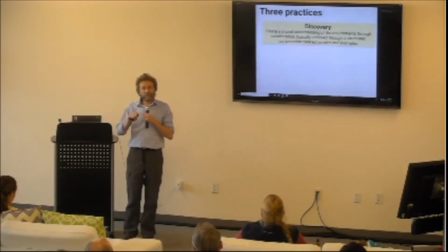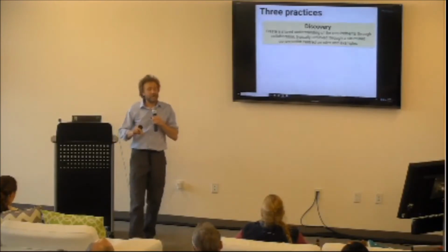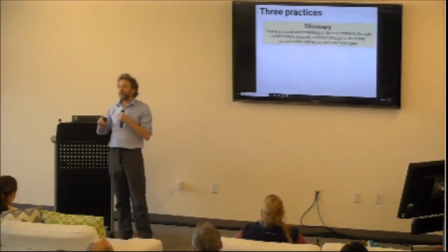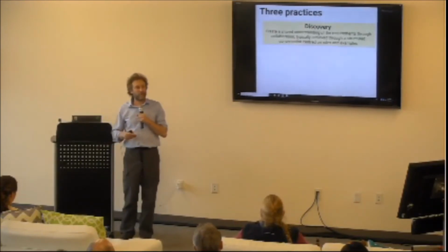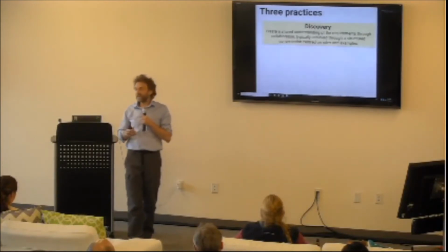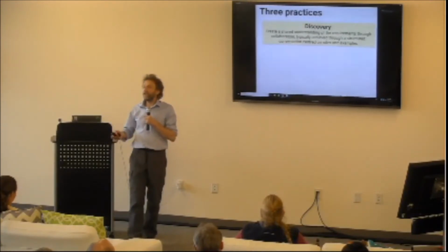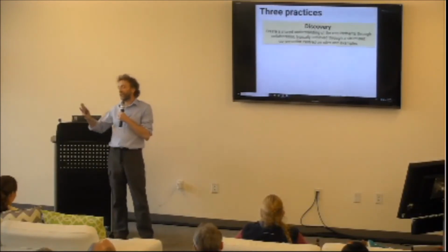The trouble is that quite often, that journey of discovery happens accidentally. It happens while you're actually working on the code. And that can derail your plans. It can derail your expectations because you weren't expecting it to happen. You've already made estimates. You've already made commitments. And now you've found something out that pushes you off in a different direction.